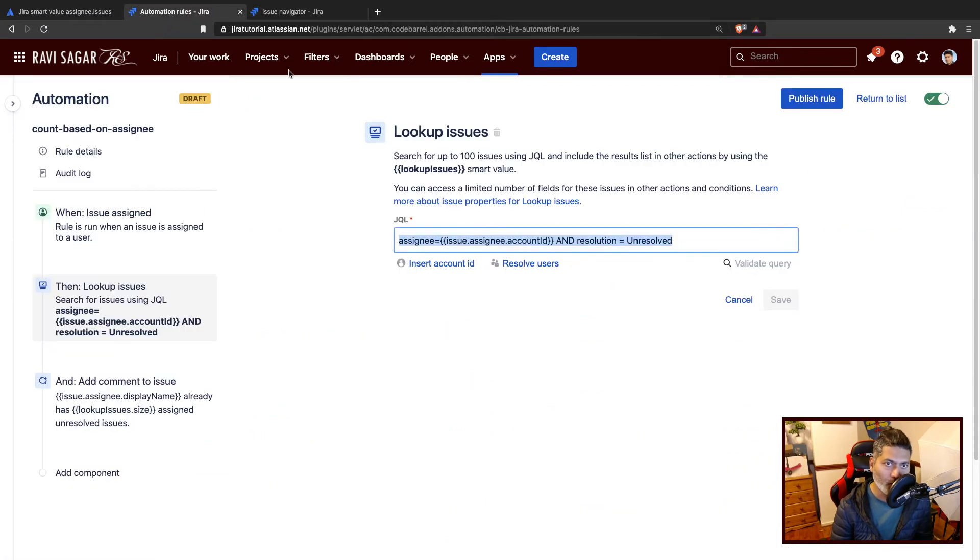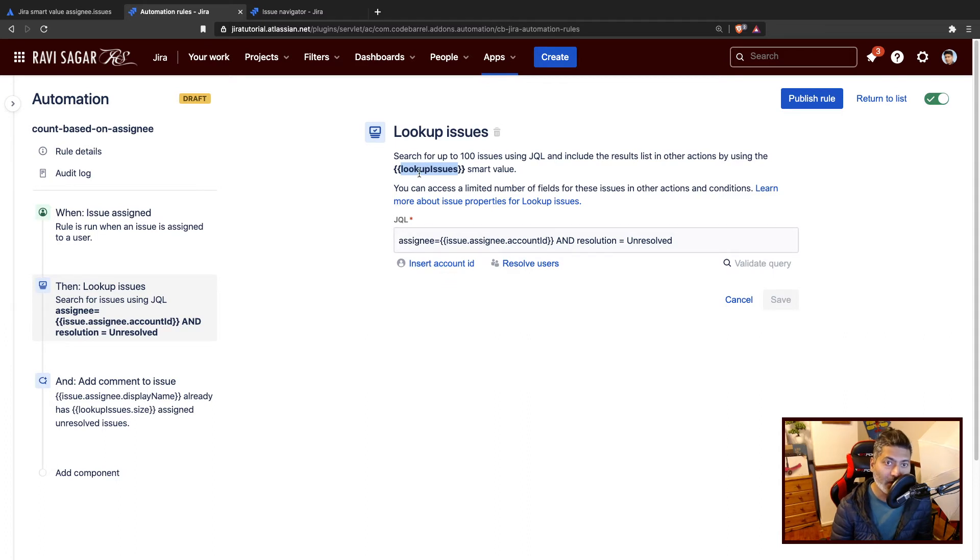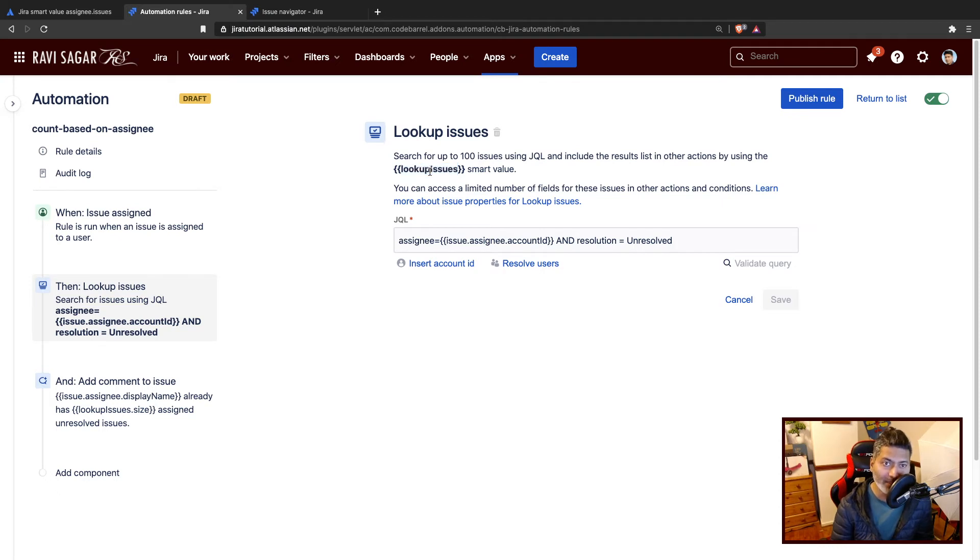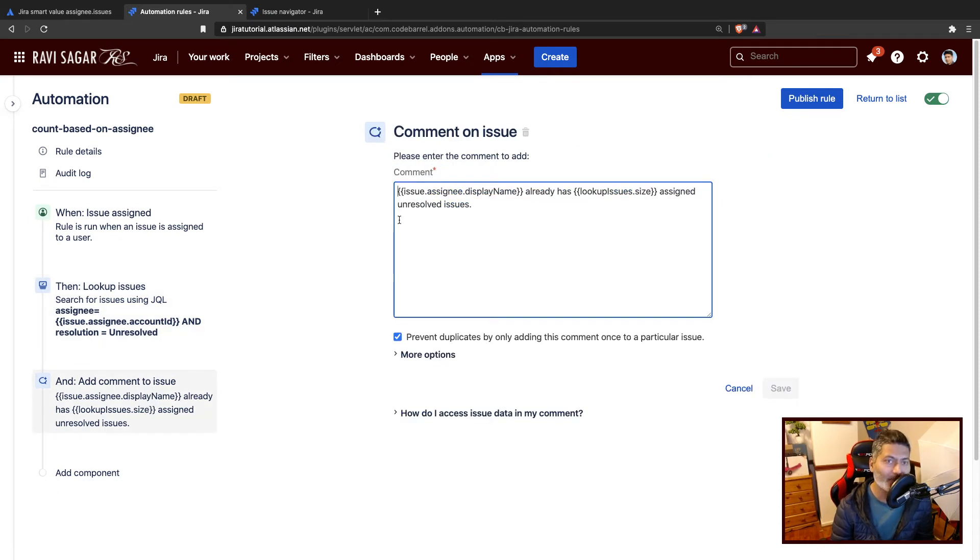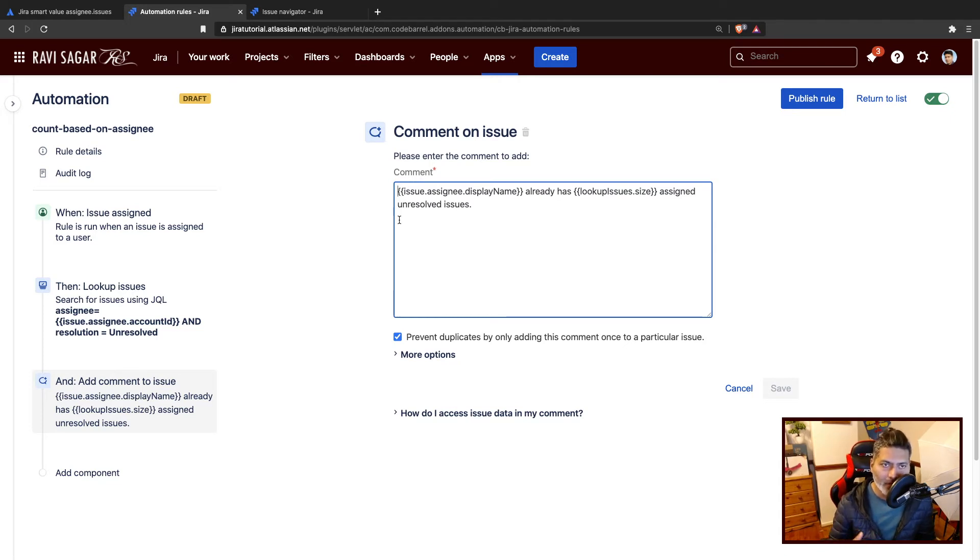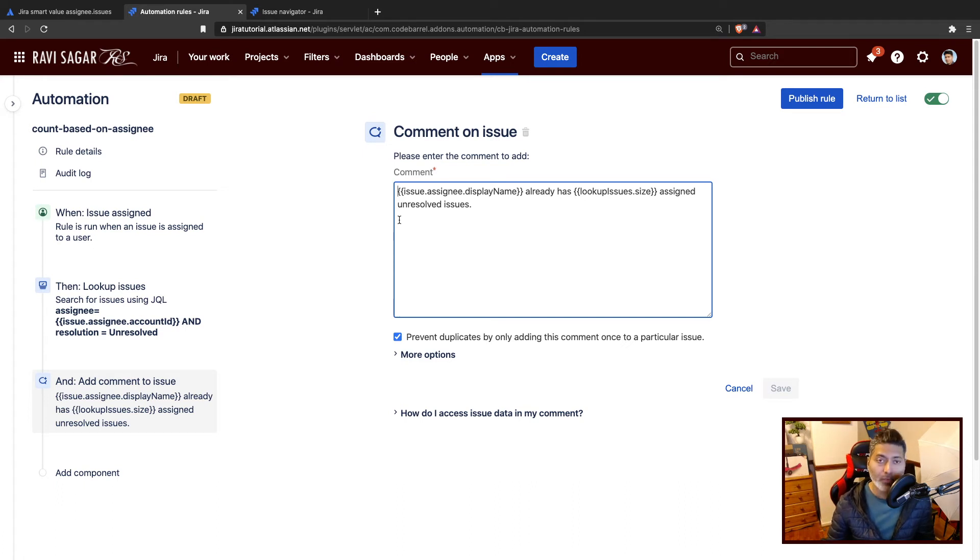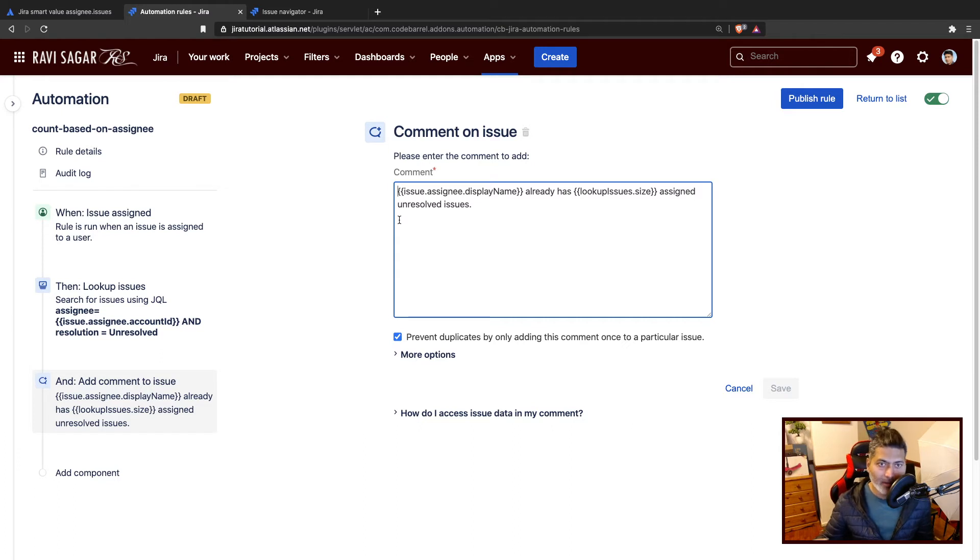If you go back to the rule, to fetch those issues returned by the JQL, you can use this smart value called lookup issues. This is a list, you will get a list of issues. You can do anything you want with the list of issues, maybe add a comment. What I'm trying to do here is whenever you assign the issues to someone, a comment will be added. You will be able to assign the issue to the user, but you will also get a comment or you can send this as a notification somewhere that this particular user already has n number of issues assigned.